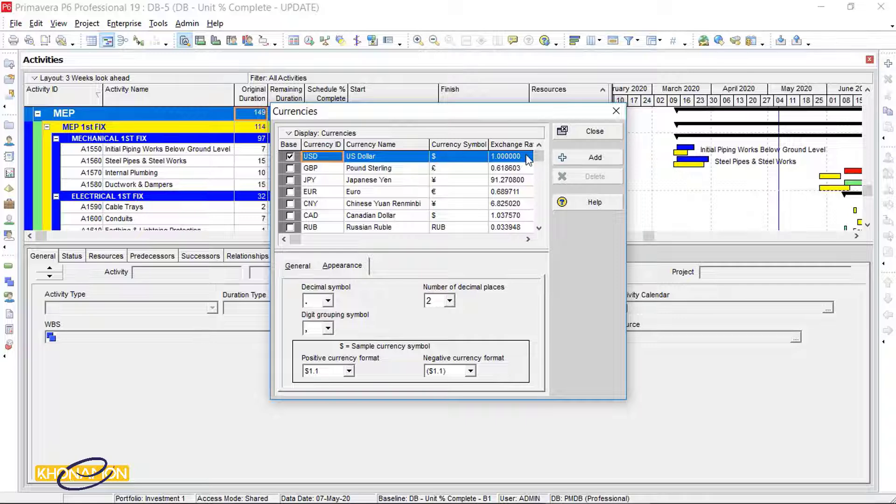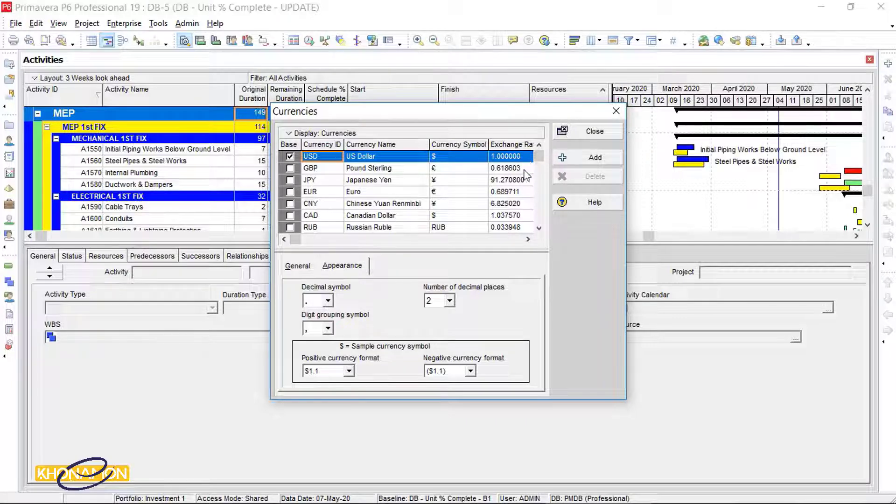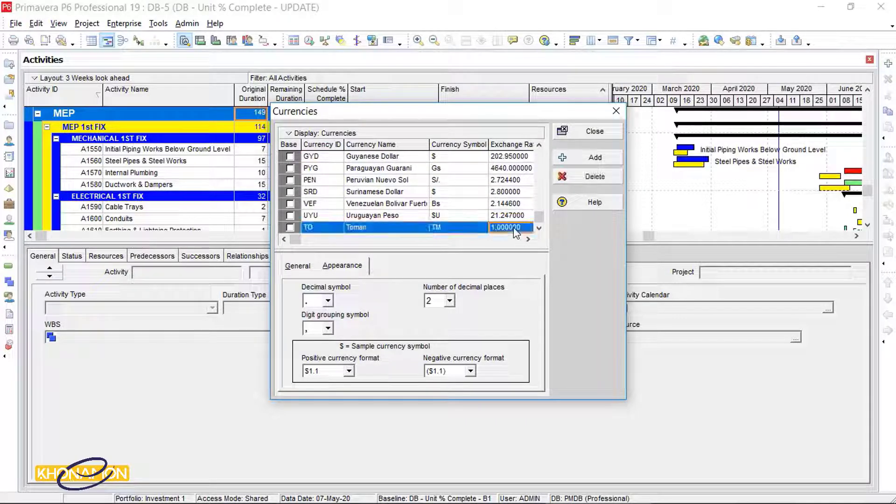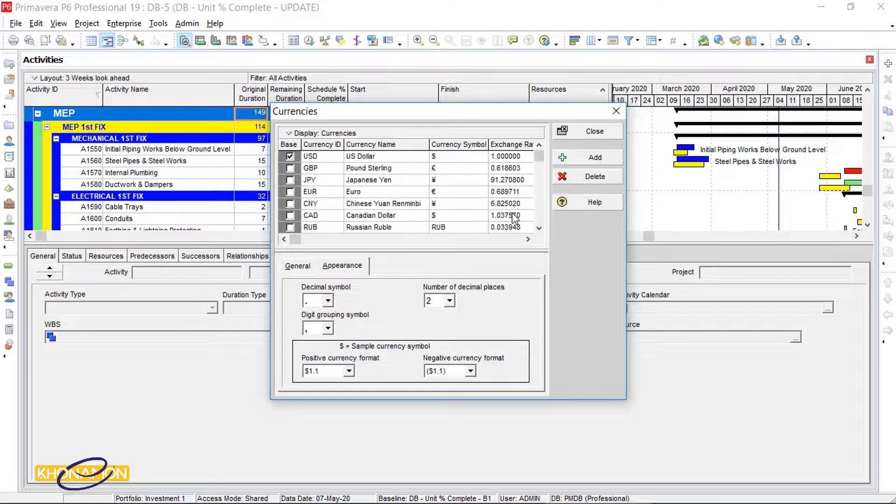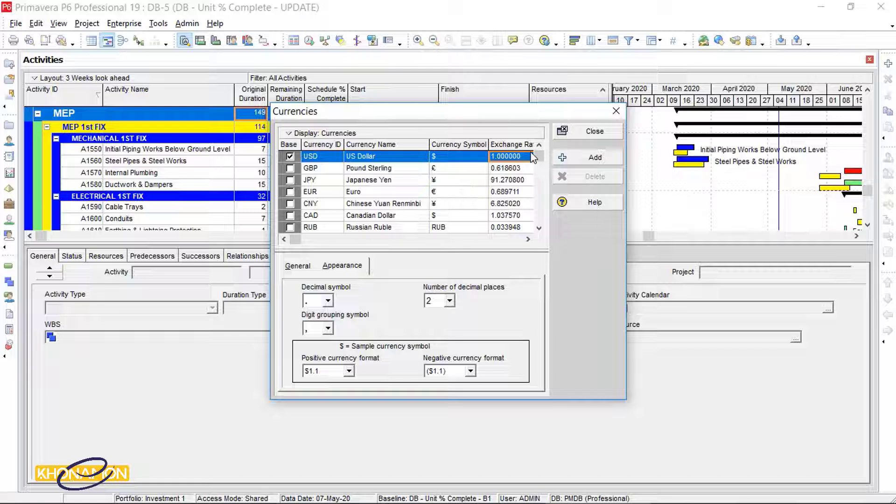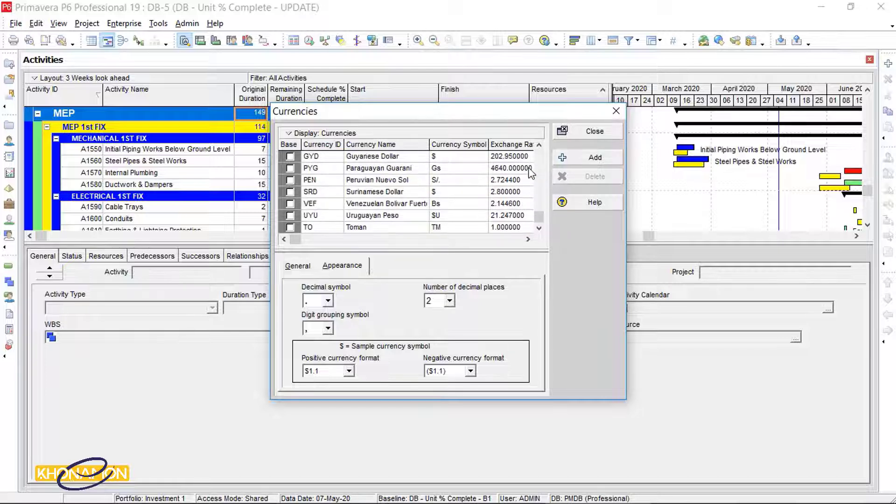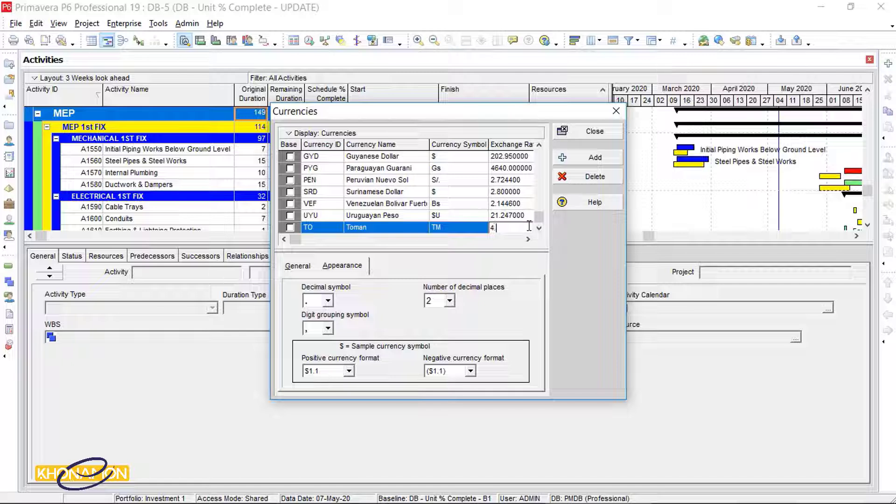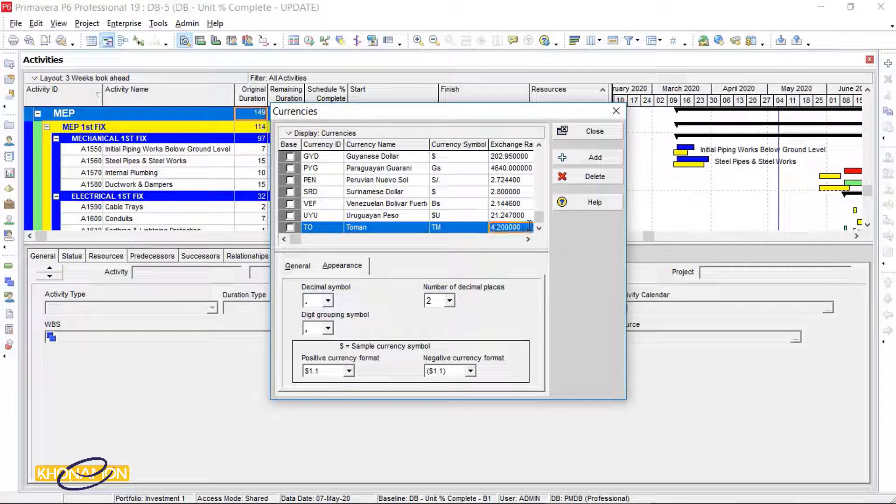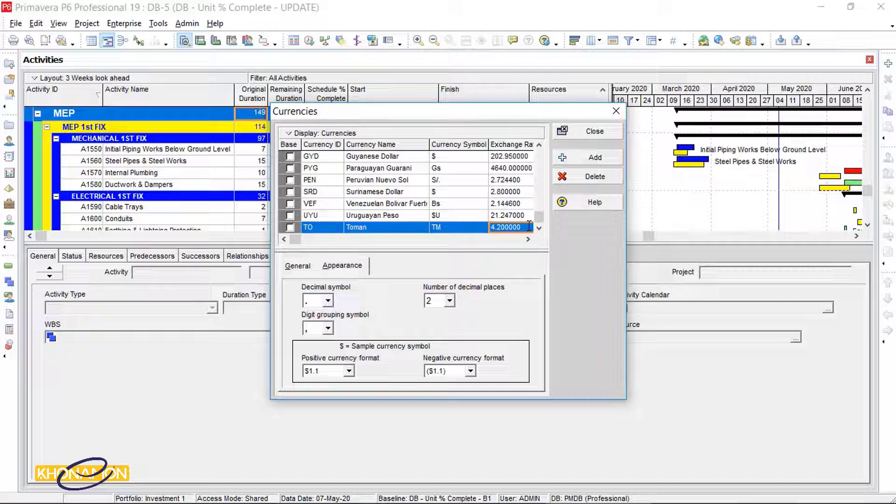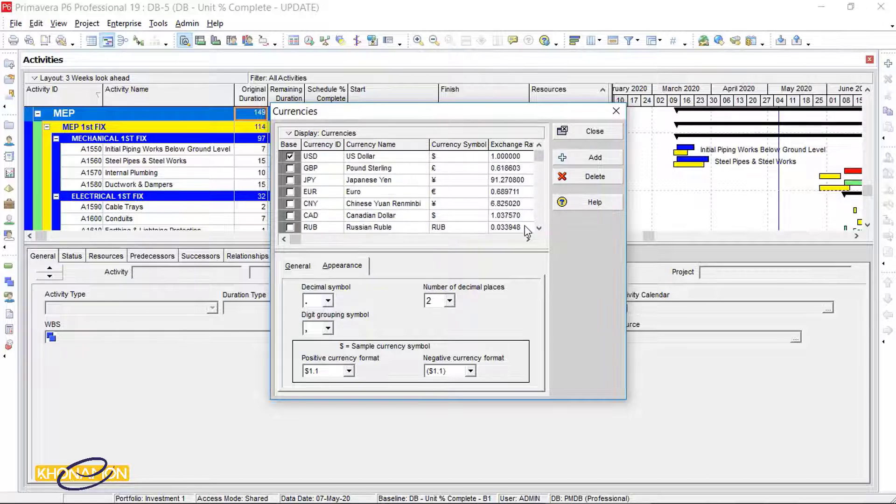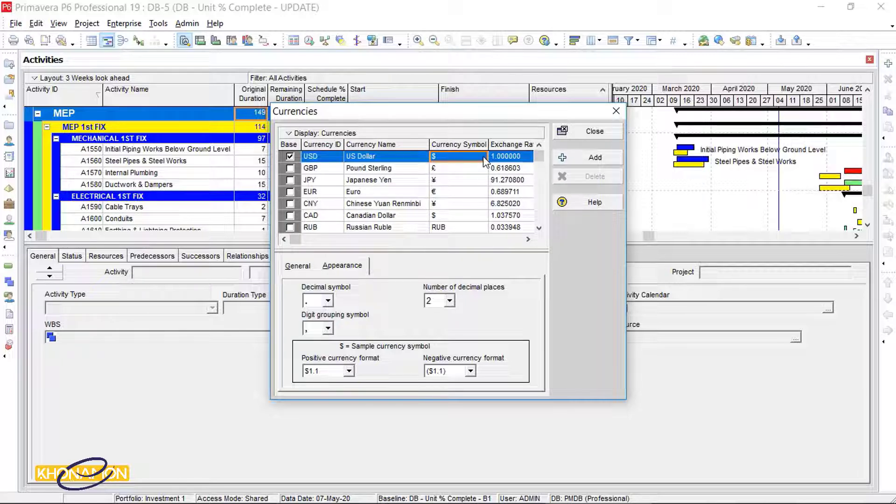Exchange rate. It says what is exchange of tomats down to the baseline currency. Here is US dollar, right? The base time currency here is US dollar. One dollar is equal to 4.2 tomats. Now suppose that our contract rate and the currency rate is the same. It is in tomats. So this exchange rate is 1 and the base must be changed into tomats, not dollars.